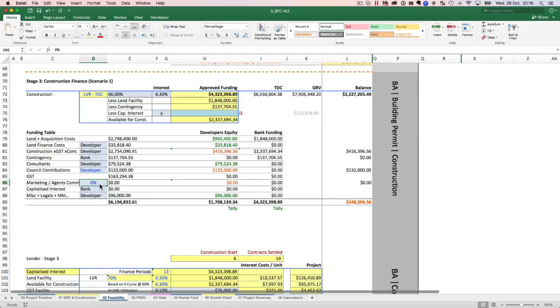And all project marketers these days will force you to say, okay, we'll get you the signed contract, we'll get you the 10% deposit and an unconditional contract, but you've got to release 50% of your marketing commission that's owed to us upfront the moment we get you the unconditional signed contract. So if that's the scenario, that means you need to have 50% of your commission ready in your hand to be able to give to the project marketers.